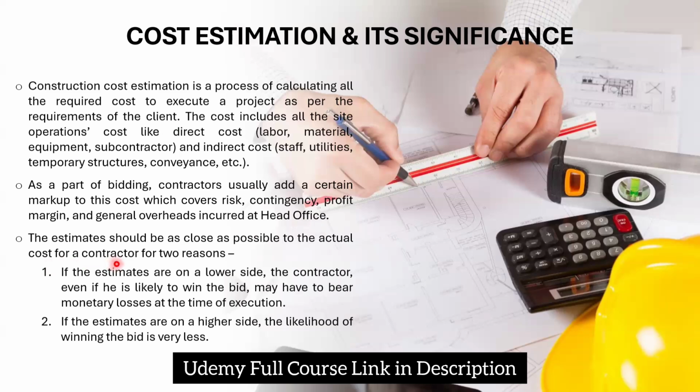Okay. Now, what is the significance of accurately estimating the cost? See, I told you, as a travel agent, I had to quote. So I had to make sure that my estimate should not be too high, because I have to compete with other travel agents also. If my estimate is too high, some other fellow travel agent will win the job and I will lose. So there is no point in giving a bid price which is too high. Also, your estimate should not be so low that you end up making a loss.